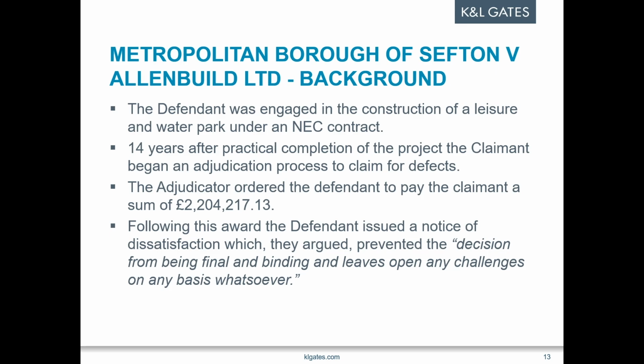So in this more recent case, Metropolitan Borough of Sefton and Allenbuild carried out works to build a leisure and water park. It was an NEC contract. The council claimed for defects by adjudication. That should actually say 4 years, don't worry, there's not been a limitation issue that they've missed. The council obtained an adjudicator's decision awarding it 2.2 million plus interest and commenced court proceedings to enforce the decision.